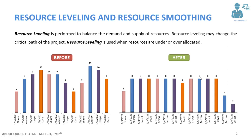As you can see, Andrew had to work nine hours on one day and eleven hours on another, which results in four extra hours of work. In order to level this resource, what we have done is moved those four hours of work for Andrew to 6th January.